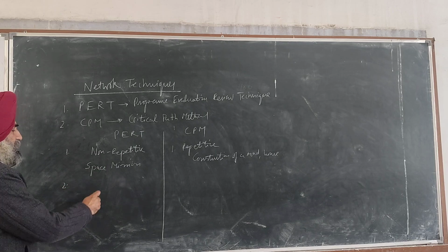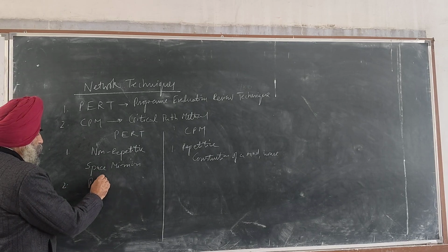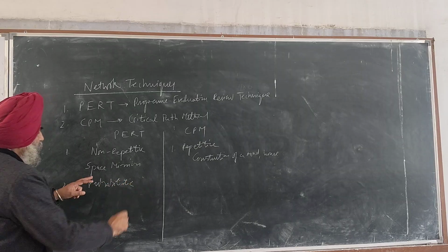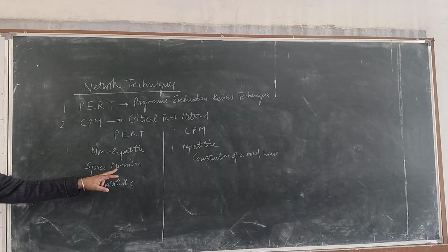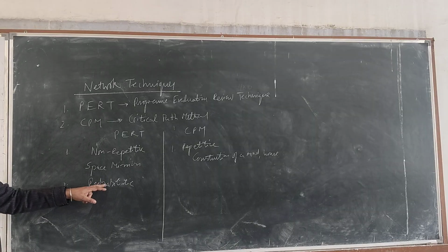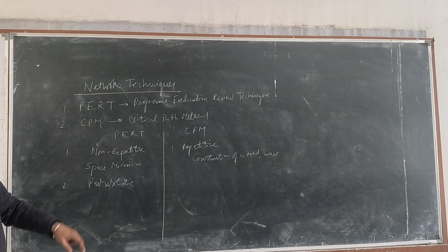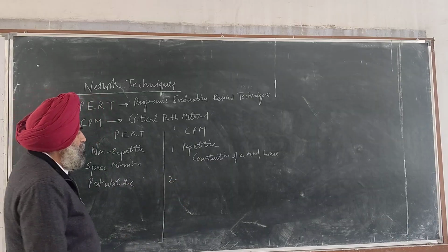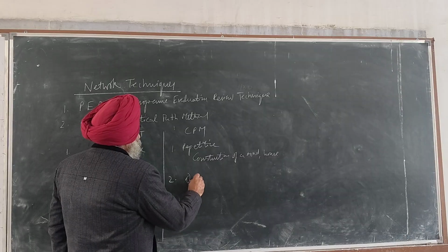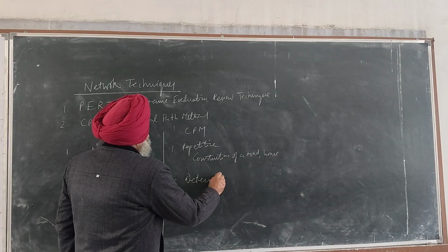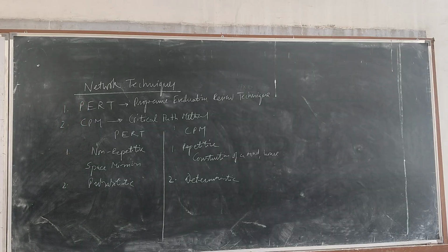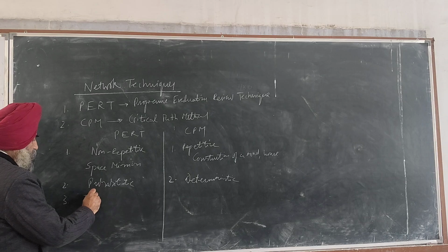Another thing is, it is based on the probabilistic theory. When we are talking about the space mission, we don't know what is going to happen there. This is probabilistic in nature, and this is another point of difference. For the CPM, this is deterministic in nature.